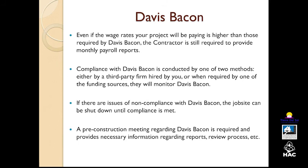And most projects will have change orders. Typically, we plan those projects with a contingency of 5 to 10% of the total construction costs. And it really depends on how much money you have in the project to begin with. Value engineering can sometimes help to keep change orders to a minimum, but value engineering can also increase the cost because you're increasing the value in the construction itself.